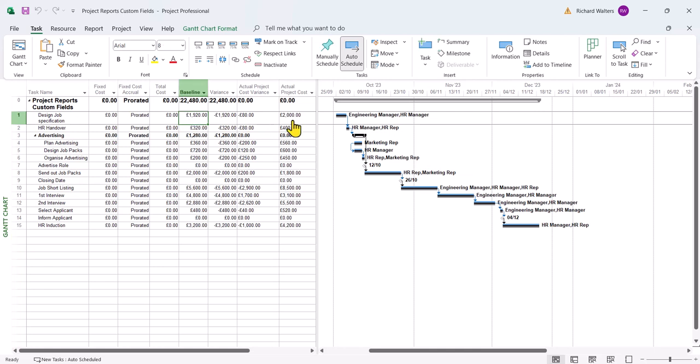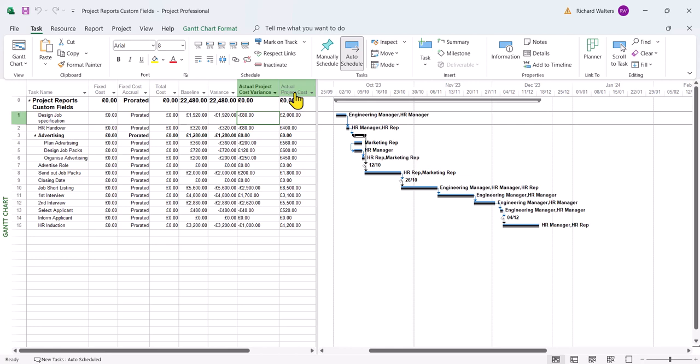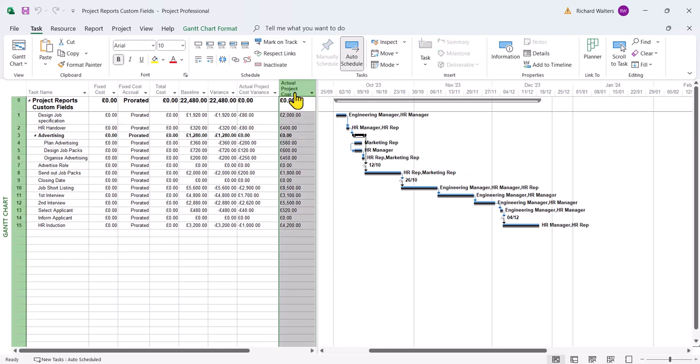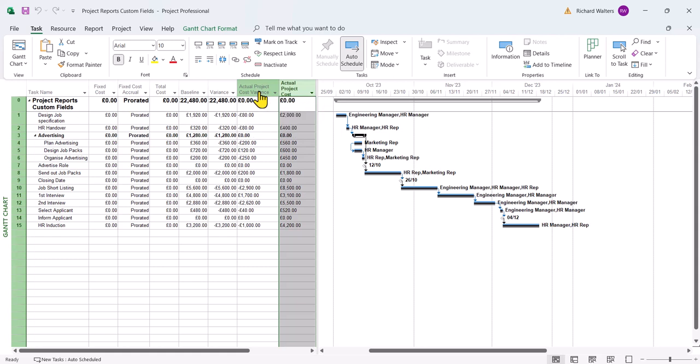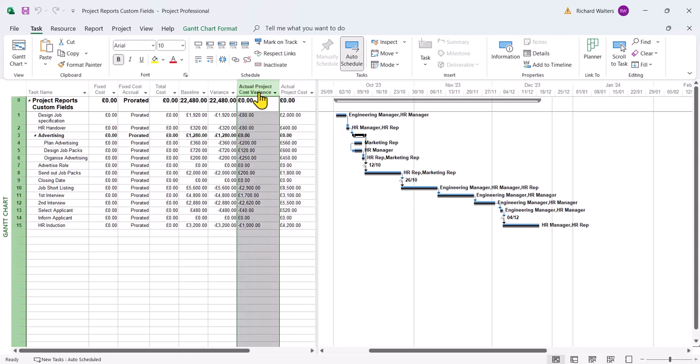The actual cost might have been an overspend, for example, in the first task. There's a variance and that's a calculation. Now these two fields, the actual project cost. This is a custom field as well as the actual project cost variance.